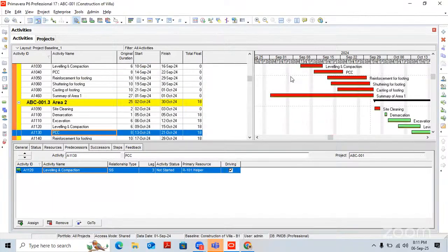My question was, the primary baseline that you assigned just now, once it becomes active, can you delete it? I was playing with a project with a baseline, and I wanted to delete that baseline. It kept telling me that this is active, you cannot delete it. Yeah, that is true. Once it's active, you can't delete it, except if you have assigned another one, then you can delete the old one.